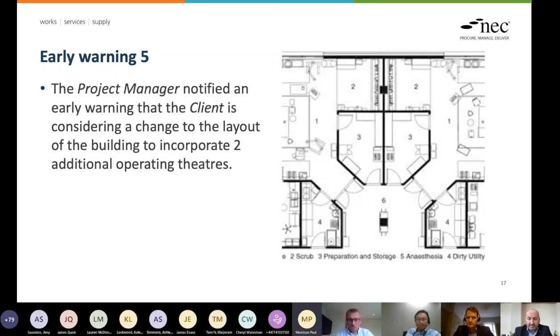Yeah, I mean, like you say, Matthew, we can just have a separate meeting, I'm sure. And I'll mention the contractor I've got a good contact with, and see if you're happy that I can have some sideline discussions about the flexibility in the frame. Because with the steelwork, it's all about the material availability. So we don't want to specify something that they can't get hold of, and that will have an impact on time. So just those sort of aspects we can look at. Yeah, I'm fine for that. No problem at all. Nice one.